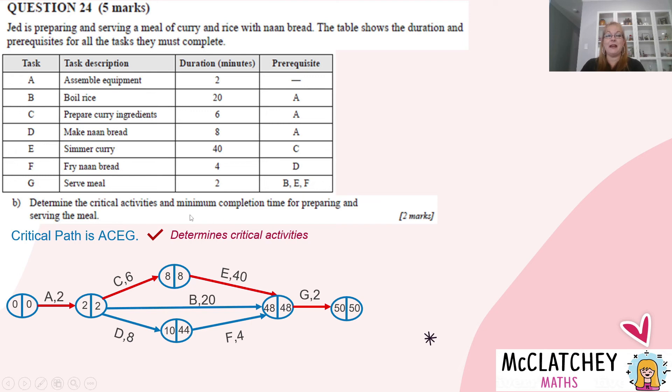And the next part is what's the minimum completion time? Well, we can see that here. The earliest you can get this meal done is in 50 minutes. So the minimum completion time will be 50 minutes. Make sure you use your units of measurement there. So that's our final mark. Notice here it included the unit. So if you'd left that as just 50, you would not have got your final mark.